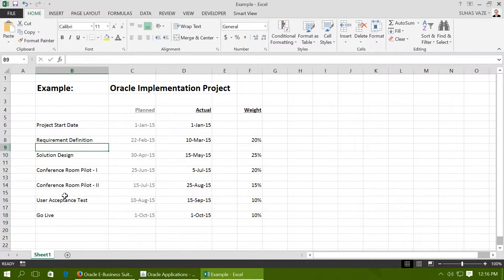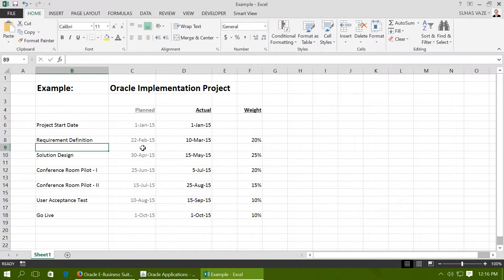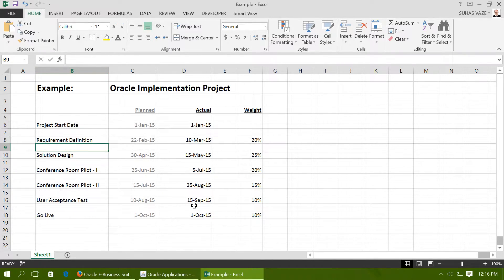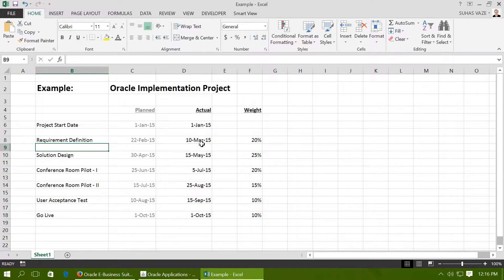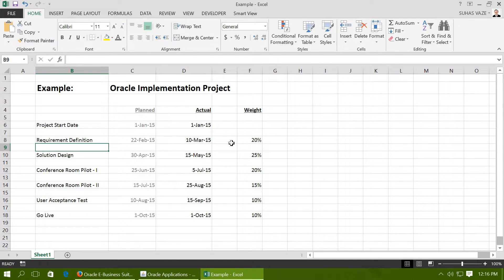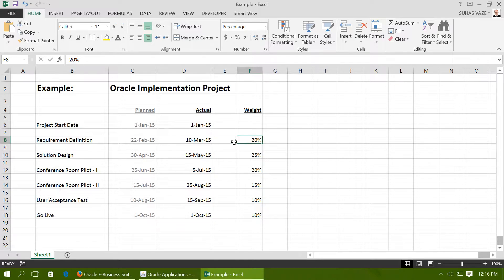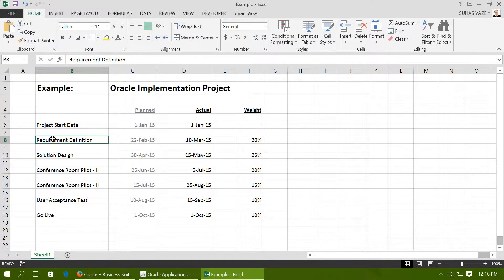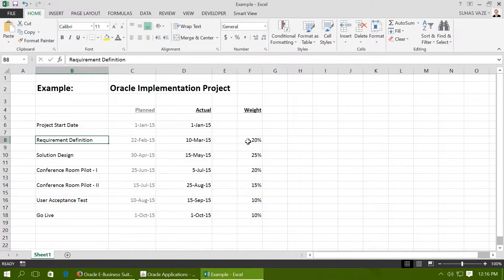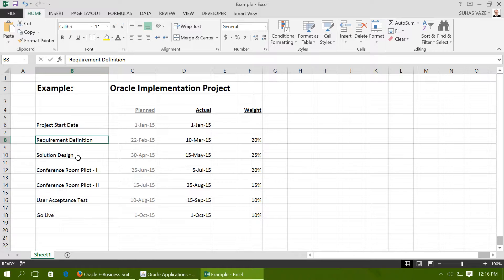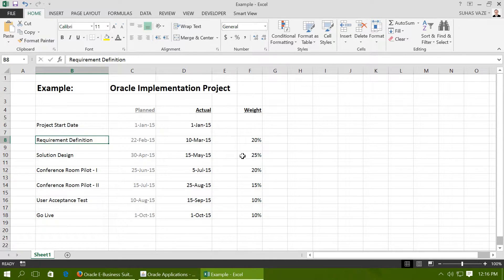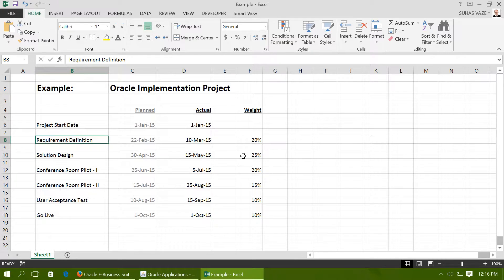Say a project start date is 1st January 15, and these are the planned dates of the project and these are the actual dates as the project happened. As per the company policy, the revenue on the project is to be determined or recognized based on the weight given to each phase. For example, when requirement definition is completed, 20% of the revenue is to be recognized on 10th March 15. Solution Design got completed on 15th May, 25% of the revenue is to be recognized on 15th May.